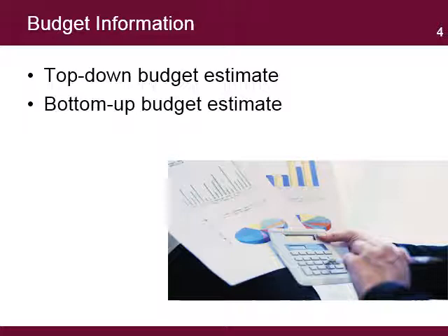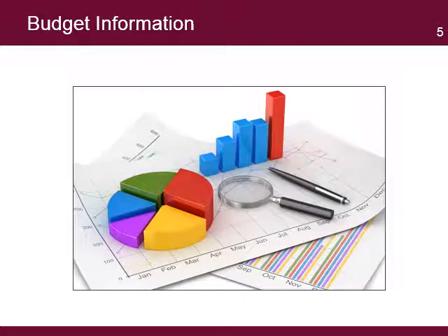The bottom-up approach is to determine how much money a project will need based on the required activities. In any case, all activities should have an estimate of the cost required to complete them. A significant benefit of having the project budget broken down by activity is to help in the analysis of project progress and determine if the project is meeting its goals on time and within budget.